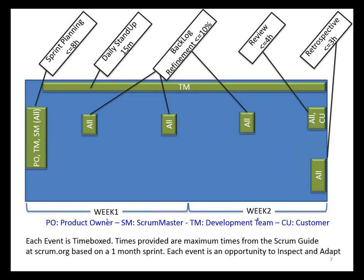A lesson from a sprint planning point of view, from a quality and test perspective. I think one of the most common lessons and problems I see is that Agile teams implement a push system rather than a pull system. Scrum is supposed to be a pull system. It's the development team that decide what they can take into the sprint. It's not a product owner or Scrum Master decision.